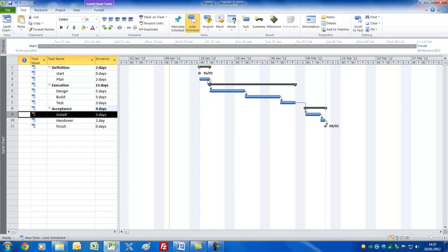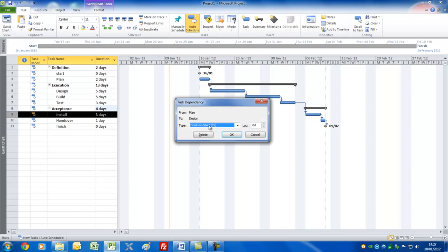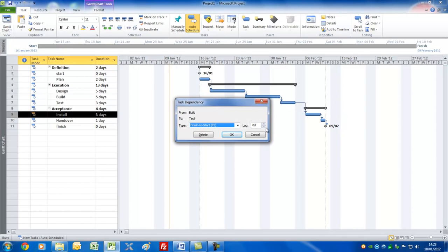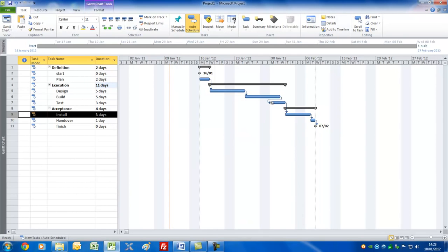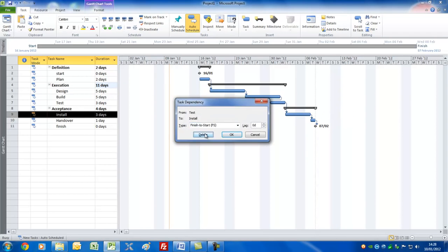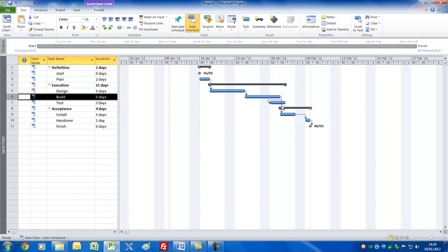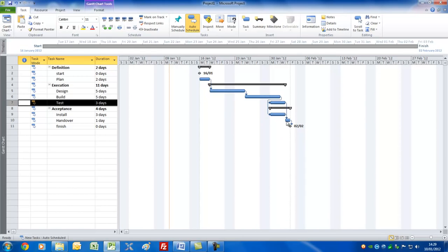I'm showing you this because I want you to get used to using this technique. You see the link arrows? If you overlay the mouse very carefully on them and double-click, you can actually adjust the way in which they're connected and change them between different relationship types. Between Build and Test, I'll double-click and put a lead in, which means we put a negative number in — and you'll see it overlaps by the amount entered. Let's show you how to delete a link: double-click again, press Delete, and that now unlinks it. Let's add the linkage again and this time put minus two days.